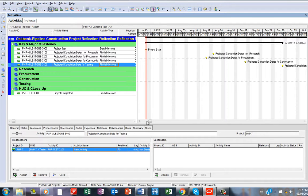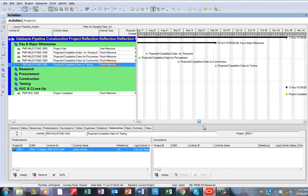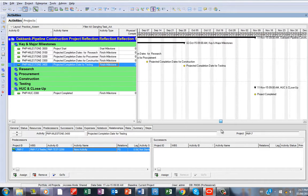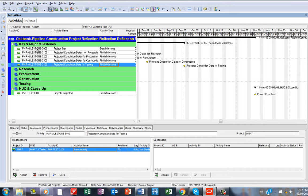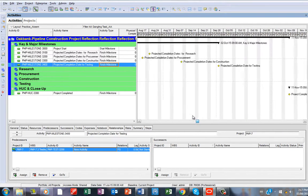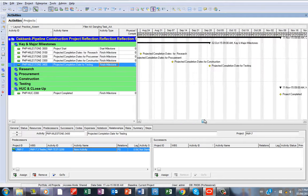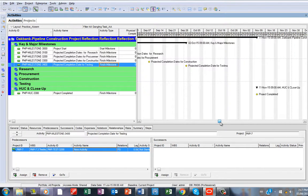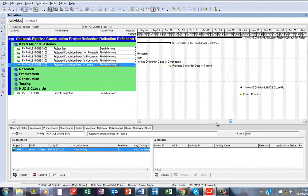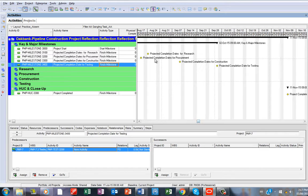As you can see in this schedule, what you have is mainly some of the work breakdown structures, which is not really wrong, and some of the milestones. I think the milestones are the only ones you could leave possibly open-ended.